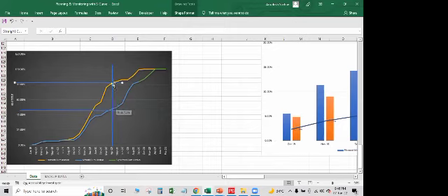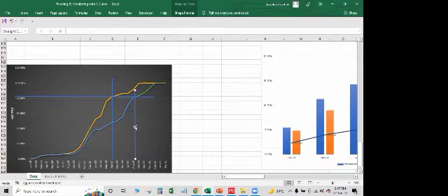Now, if you have planned in the month of April that you will complete something 80%, then when are you going to achieve that, right? You have already got delayed. Then you can just extend that row and put it like this. So now here is when you will be achieving 80% progress. First of all, you planned it for the month of April, and now it's something around August, right? So 1, 2, 3, 4, approx 4.5 month delay, right? So this is how using the S curve, it becomes quite important for you so that you can monitor the physical progress of your project.